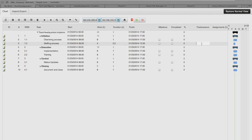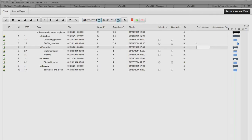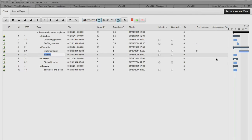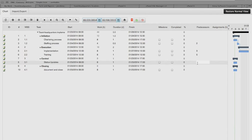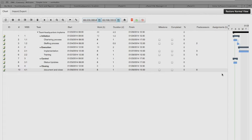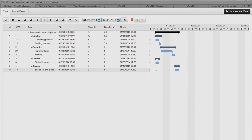Our staffing process will come after our chartering process, so we want to set a predecessor. Item number two has to be completed before number three, so our predecessor here is number two. We can see in the Gantt graph that it's connected the dots together. We know staffing and chartering need to happen before implementation, so implementation cannot happen until number three is completed. Then number five has to happen before that. Our status updates aren't really connected — they can happen anytime during the process. But documenting and closing the project cannot happen until after training, so we'll put in predecessor number six.